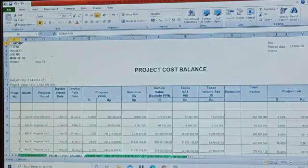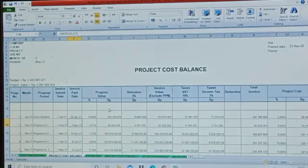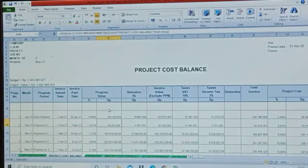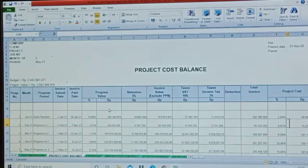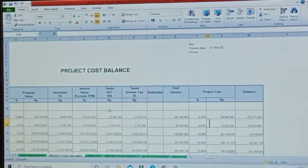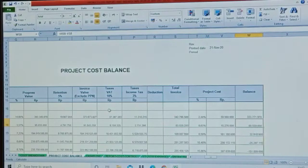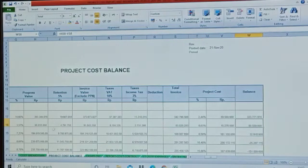Then there is project cost balance. In this section you will see the comparison between paid progress billing here and the project cost incurred during the project, also its balance.